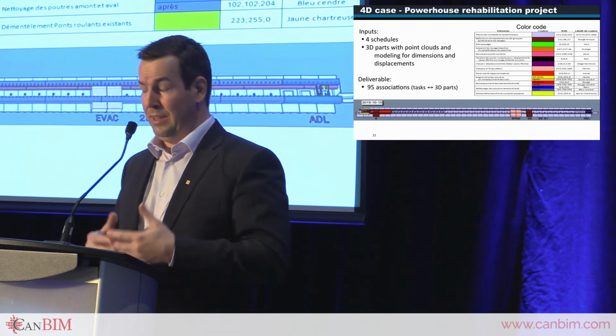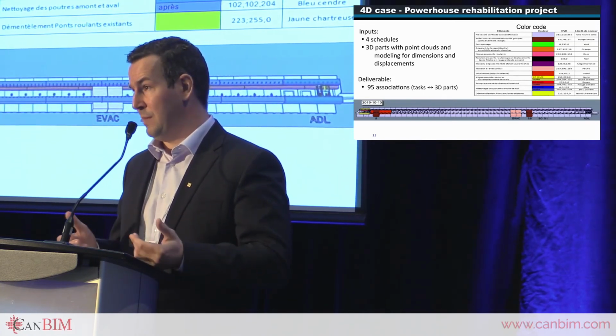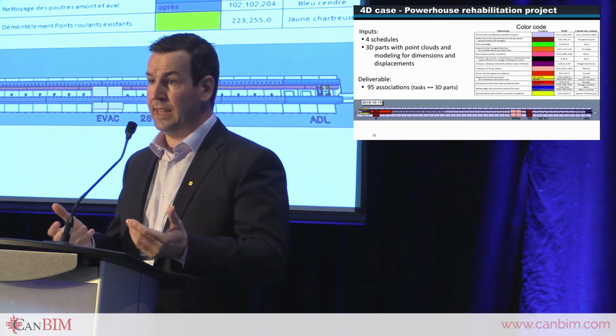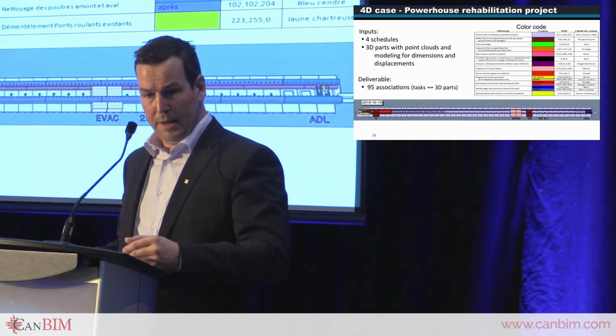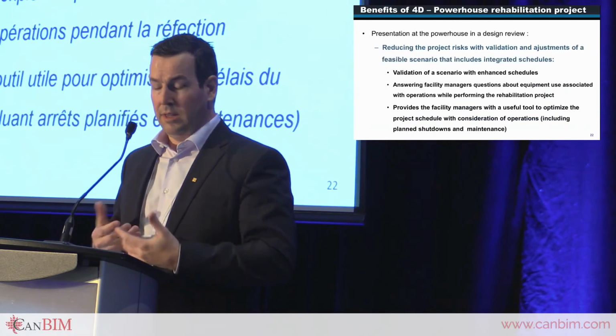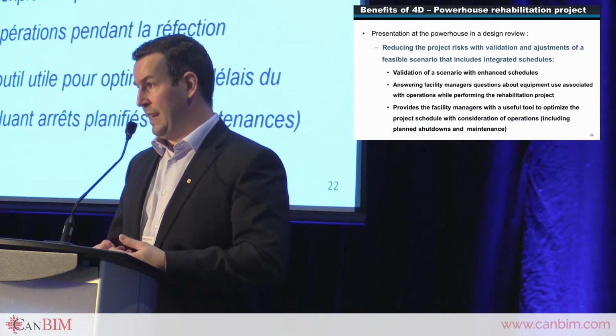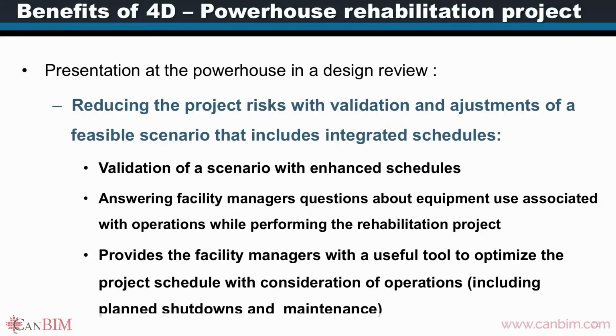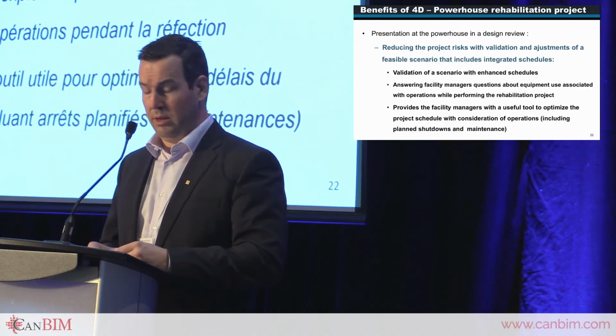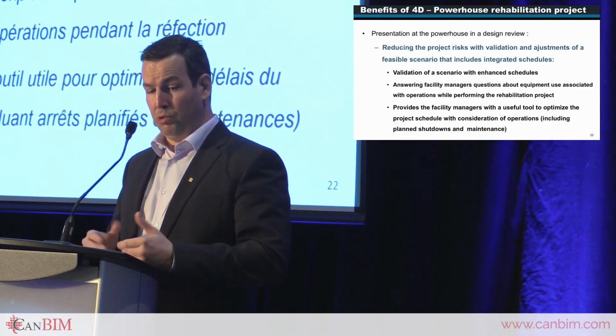In this project, what you saw for a fairly complicated powerhouse, there were only 95 associations between 3D and scheduling activities, so it's not so complicated. And the usefulness is that we were able to present this to the operator during design reviews. And it reduced the project risks because we were able to validate the timeframes fairly far upstream. We were able to improve the scheduling scenario. It answered the operator's questions for using associated equipment for operations during the actual rehab work.